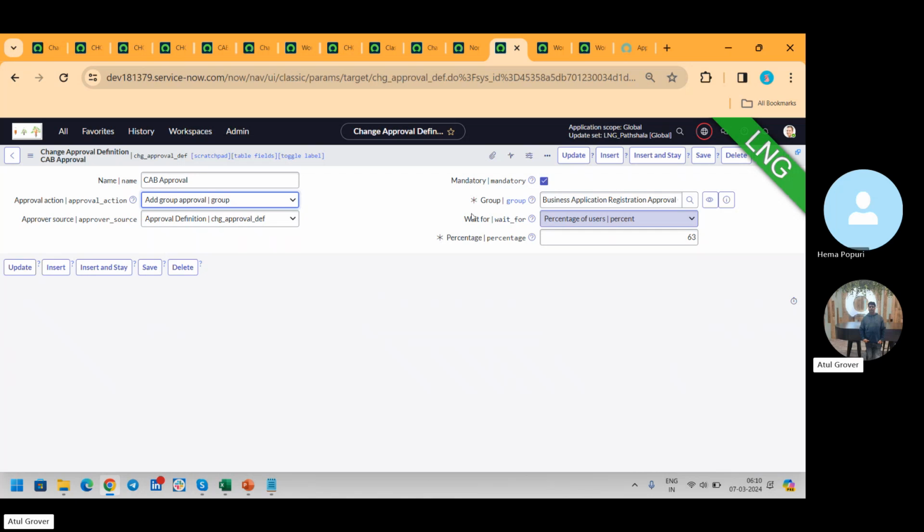Okay. Logically it should go to the assess state again, but in my case, I literally faced this issue earlier as well. In some users it's skipping, sometimes it's going properly fine. Not sure why it happens. Practically it should happen this way: a change can get rejected in only 2 places, either the new state, the assess state or the authorized state. In any of these cases, if it gets rejected, the change will always go back to the new state.